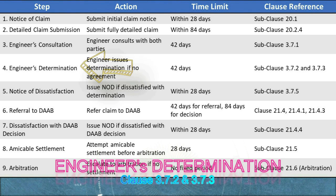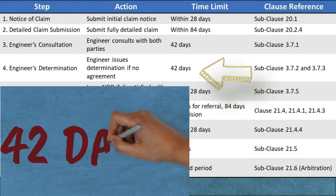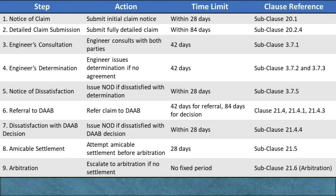Step 4: Engineer's Determination. Action: If an agreement is not reached during the consultation period, the engineer must proceed to issue a determination. This formal determination includes a reasoned decision with supporting calculations, providing a clear statement of the engineer's view on the claim based on contract terms. Time limit: The engineer has an additional 42 days to issue this determination if no agreement was reached, unless a different period has been mutually agreed upon. Clause References: Subclause 3.7.2 — Engineer's Determination; Subclause 3.7.3 — Time Limits. Purpose: The determination stage offers a neutral decision from the engineer, which serves to resolve the claim in a formal manner, minimizing further disagreements and enabling the project to proceed smoothly.